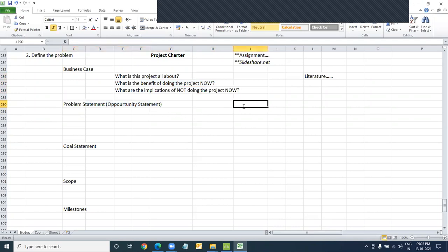We would link this business case with the management way of answering the 5 Ws: what, who, where, when, why? So when somebody is reading your business case, they should be able to understand: what is the problem, who is affected, where it is affected, when it is affected, since when it's affecting, and why we should start this because of the cost, showing numbers like this.